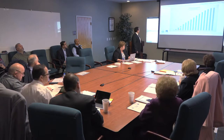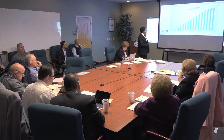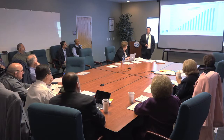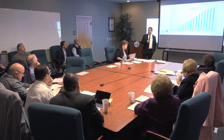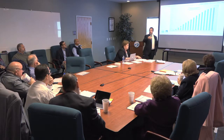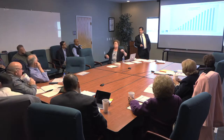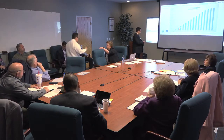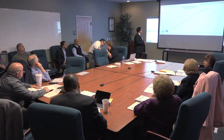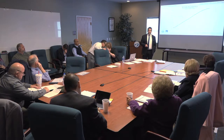Looking at the numbers, so far we've paid $912,961, and I didn't realize there's a big gap in there, but I think part of that is because we started 30 days late, and because it's not in the contract yet. If you recall that little box that I showed that extended the days 30 days, that's not in the contract yet. I just was giving you a heads up that's coming up. And as such, these numbers here are actually based on contract dates and numbers. But we're okay. When you're looking at the percentages, they're at about 7.23% of the construction cost expended.